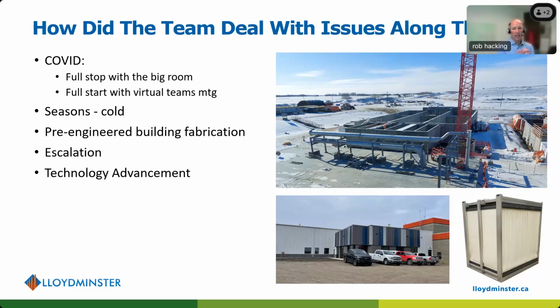Escalation was a big one. We haven't talked much about technology on this webinar, but one of the things we did do is introduce the latest MBR technology at the right time in this project. That cost advantage of using the latest technology was actually able to mitigate a lot of the escalation that we were seeing in the project. That was a good example of a technology vendor and its technology advancement bringing in the latest technology that had lower operational cost, but could also be delivered at a lower cost profile, which helped offset some of this escalation.